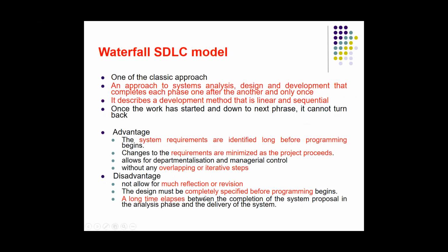And disadvantage, it does not allow revision. Once you sign off the phase, you sign off the requirement, those requirements are signed, fixed, firm, complete, closed. You don't go back. And then after you get the requirement, you do the programming. Once you do the programming, you test it. Once it's tested, the solution is developed. You do not go back.